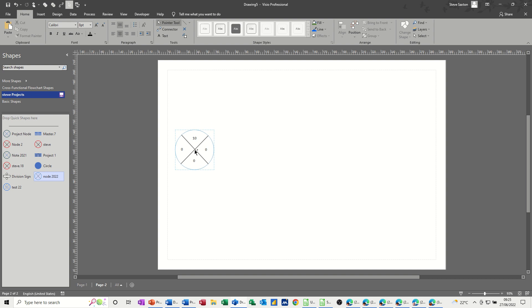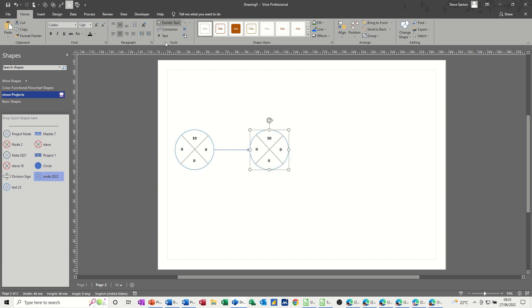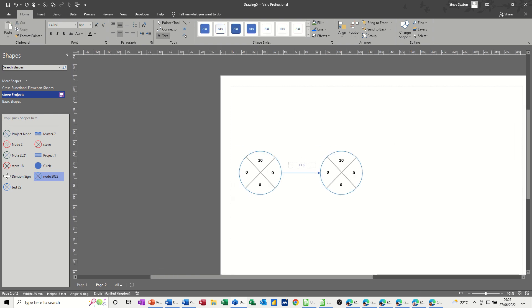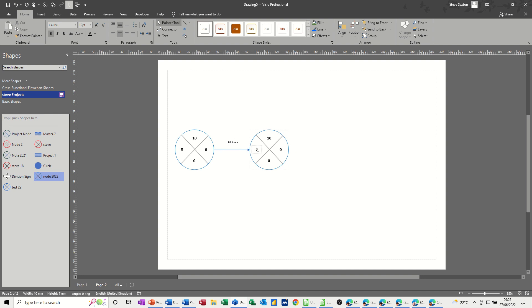You bring your first node onto your screen, then you can put the connector tool on and it will automatically connect, though sometimes it goes all over the place and you'll have to correct it afterwards. So that's the first event. I want a second event, and in between there needs to be an activity. The activity is where you put the text, so I'll put a text box in there — the first activity is Fill, and you need to put the time: fill one minute. This box here is the earliest event time, so that's going to be one — that first thing takes one minute. Fill kettle.